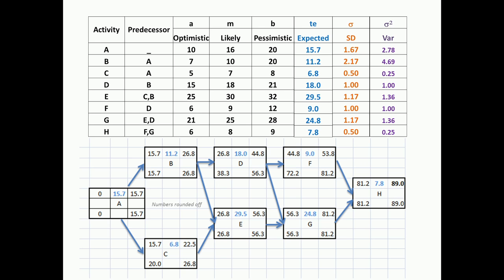In the next step, we take the expected values — A is 15.7, B is 11.2, C is 6.8, D is 18. We use the expected values as the basic duration of each activity and perform the forward pass and the backward pass, giving us the early start and early finish for all activities. Some of these values are rounded off. When we add the activities up, you can take a guess at what the critical path is. Ultimately, H finishes on 89, so that is the project duration — 89 days.